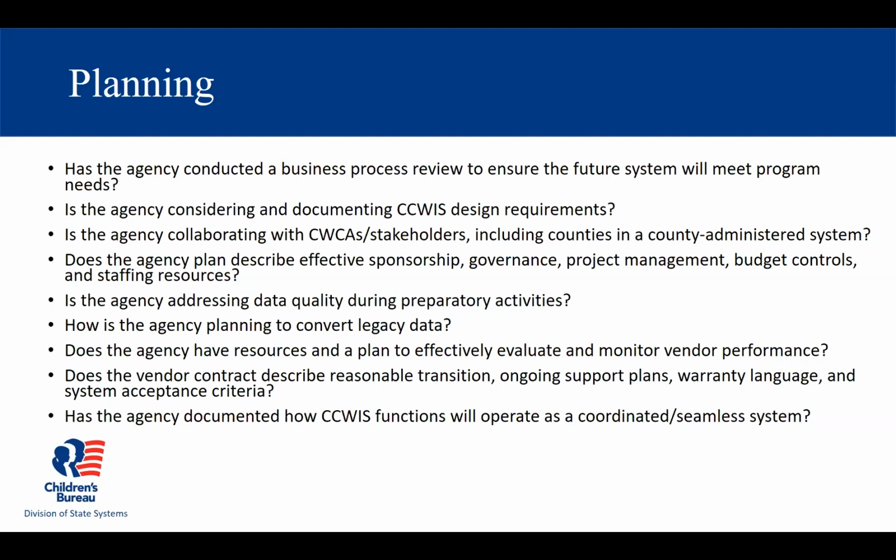Another one I want to focus on is, is the agency collaborating with child welfare contributing agencies, in other words, CWCAs, or other stakeholders, including and especially counties in a county administered system. This is really good to get started early to develop these relationships. If you need to set up agreements, MOUs that establish data exchange or other understandings between the programs, it's very good at this point that you can start to establish roles and expectations for how these stakeholders will be involved in the development of the project and the testing of the project.